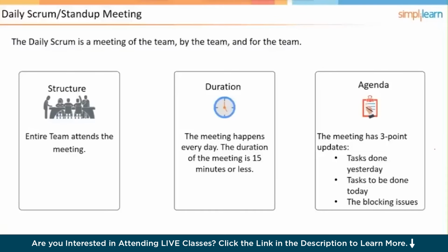Duration 15 minutes, we talked about that. And the agenda: what did I do yesterday? What am I going to do today? And what are my impediments?